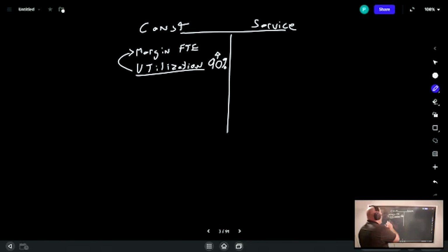And the reason why is I can have a project that has $100 in it, and $10 of that $100 is margin, and I'm charging $100, right? Now, that's fine if that's how it was estimated. The problem becomes I charge $200. I am technically utilized, but I am now in negative margin per full-time equivalent or full-time employee, depending on how you like the FTE definition or acronym. So do not chase utilization at the risk of eroding margin.